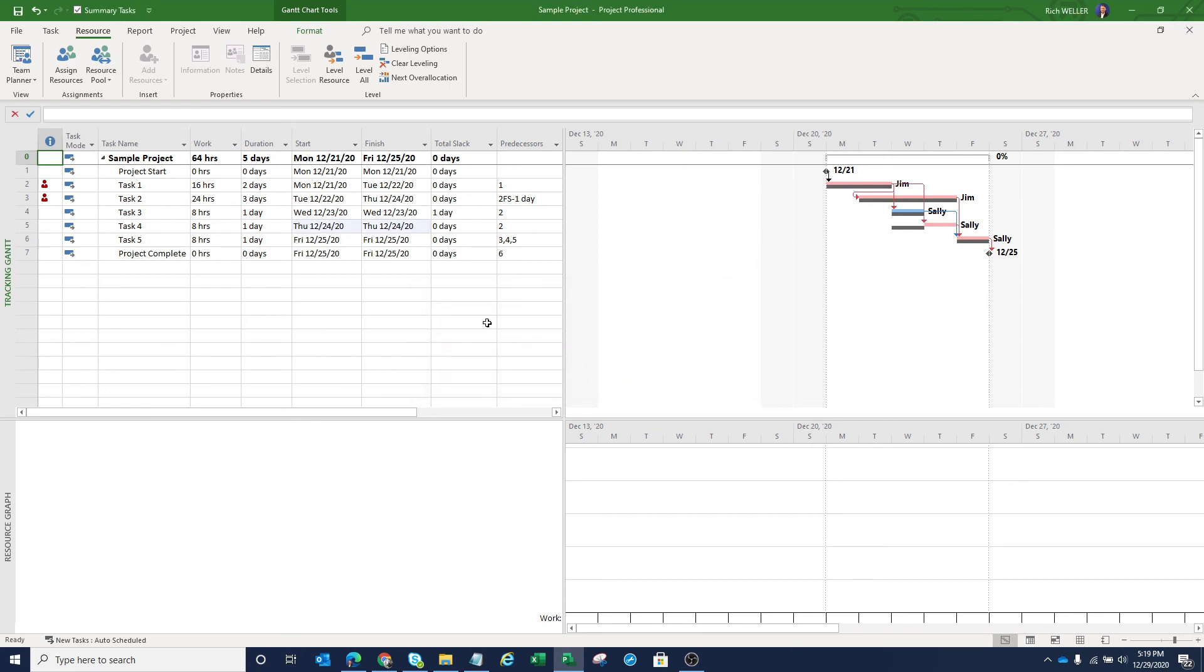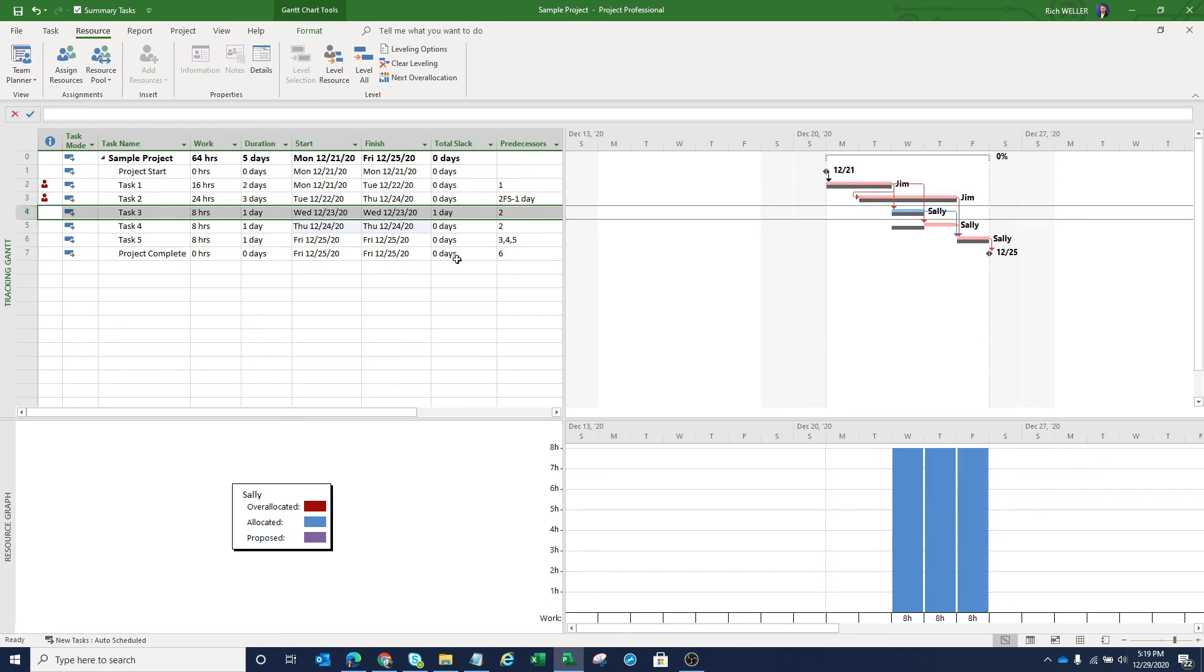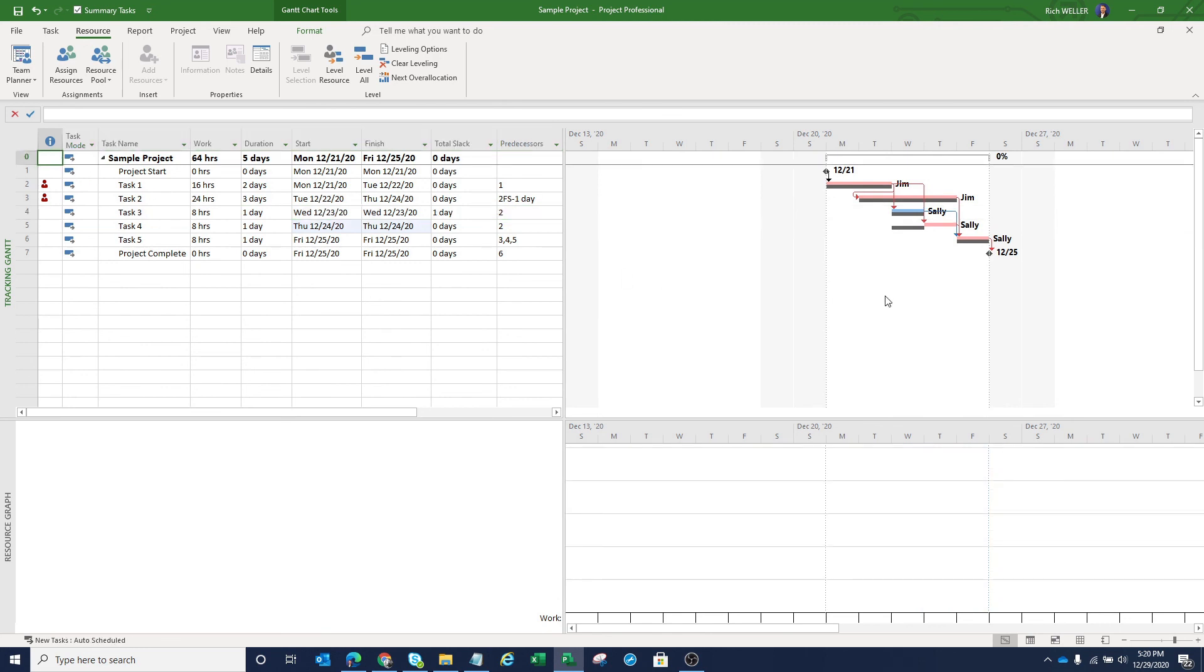And so it skipped the items that it couldn't resolve. With that being said, you'll notice that Jim is still over allocated because his tasks were on the critical path. But if you look at Sally, Sally is no longer over allocated because she had tasks that had slack to them. So Microsoft project was able to pick up one of those tasks and remove that over allocation. Again, by following this resource smoothing approach, this approach did not impact the critical path. And this project is still targeted to be complete by 1225.